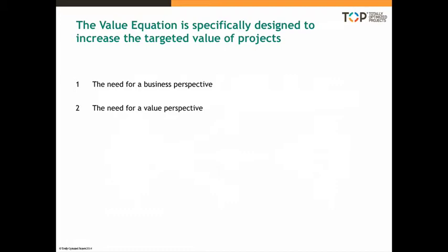In many business cases, the benefits exist to offset the project's cost of delivery. Therefore, once you have enough benefits to cover the project's costs, you stop looking for benefits. This allows all the remaining unidentified benefits to be missed and therefore unlikely ever to be delivered. If you don't know they exist, you will either design them out of the realm of possibility or you won't target them for realization because you don't know they're there.